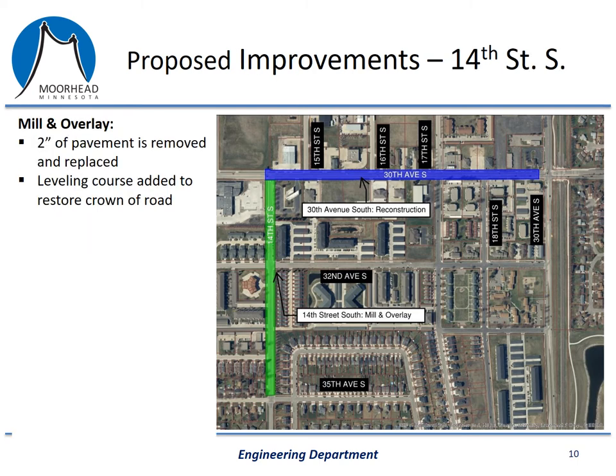The scope of work on 14th Street South is relatively simple and includes a mill and overlay, meaning we will remove and replace only the top couple inches of pavement. Along certain areas of the road, we will add a leveling course and reshape the crown of the road to improve drainage.